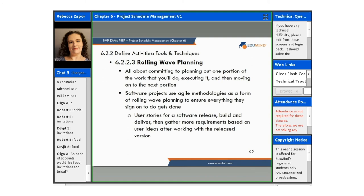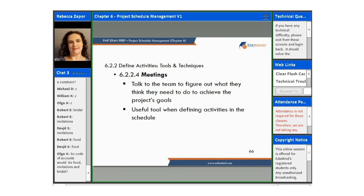Rolling wave planning is all about committing to planning out one portion of the work that you'll do, executing it, and then moving on to the next. Software projects use agile methodologies as a form of rolling wave planning to ensure that everything they sign on to do gets done. For example, with user stories for a software release, they build and deliver, and then gather more requirements based on user feedback after working with the release version.